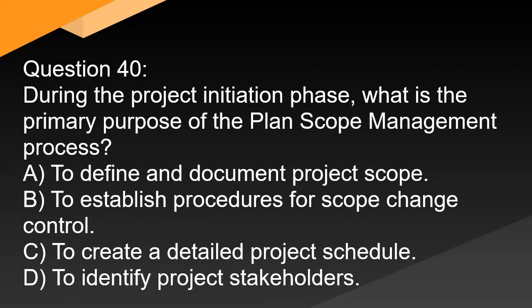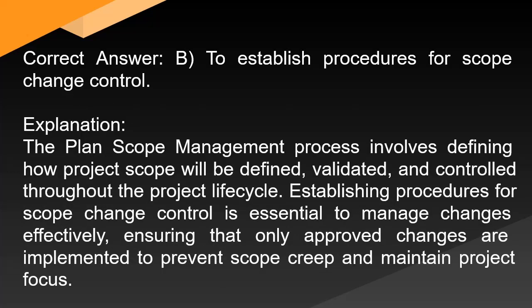Question 40: During the project initiation phase, what is the primary purpose of the plan scope management process? A. To define and document project scope. B. To establish procedures for scope change control. C. To create a detailed project schedule. D. To identify project stakeholders. Correct answer: B. To establish procedures for scope change control. Explanation: The plan scope management process involves defining how project scope will be defined, validated, and controlled throughout the project lifecycle. Establishing procedures for scope change control is essential to prevent scope creep and maintain project focus.